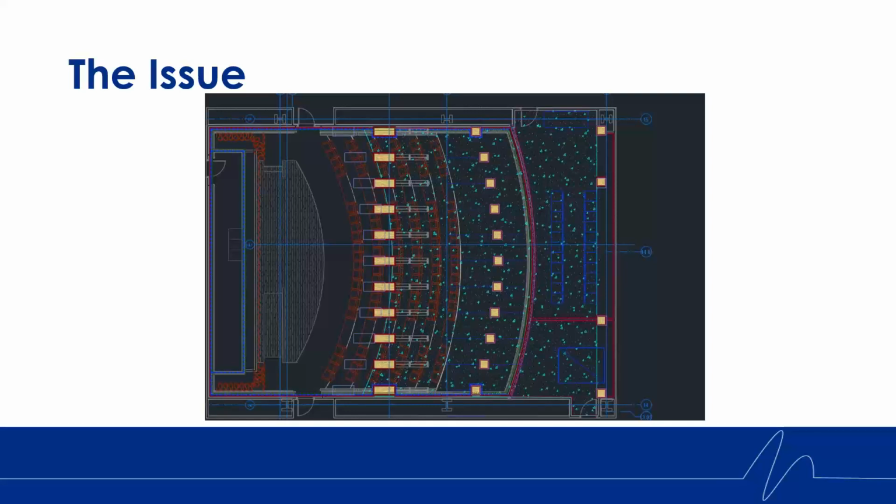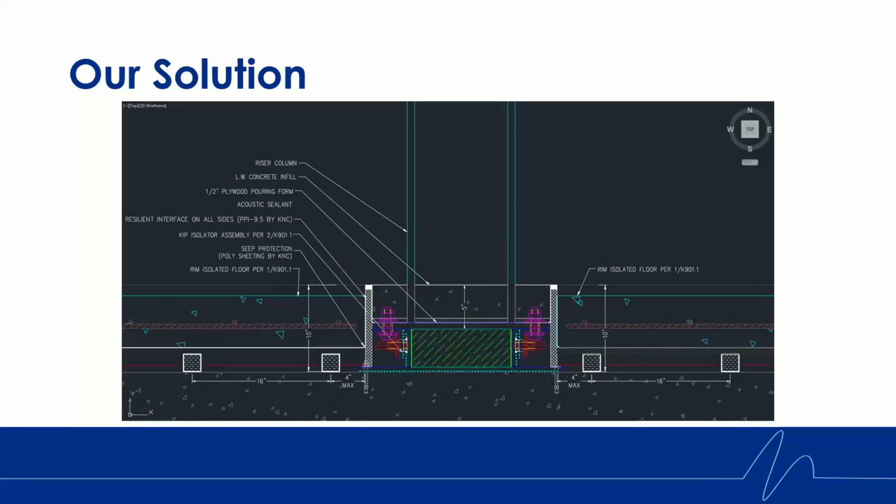Kinetics issued an RFI for the riser weight the first time the drawings were reviewed, but no one had the information at that time. If the Kinetics rep had been consulted during the design phase, the issue of how to support this type of load would have been identified and would have been a part of the budget and bid documents. When the information was provided to Kinetics, we developed a solution within 11 days for a seismically restrained isolator for the riser. The delay and change order could have been anticipated had Kinetics been part of the design phase discussion on isolation requirements and costs.